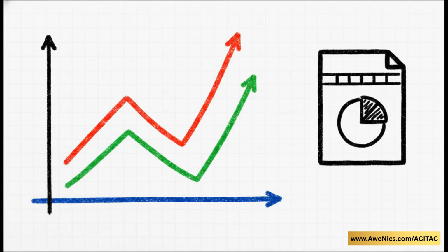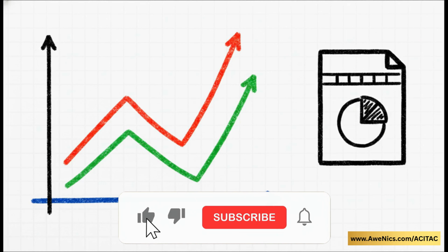Once it's in Excel, it automatically generates a pivot chart, and the color coding tells you the whole story. The red line represents your planned value, the blue line is your earned value, and that green line is your actual cost. Looking at our May 21st scenario, the red schedule line is climbing aggressively, right? Meanwhile, the blue earned value line completely flatlines at 0. It's an undeniable visual of a project that's just stuck at the starting line.